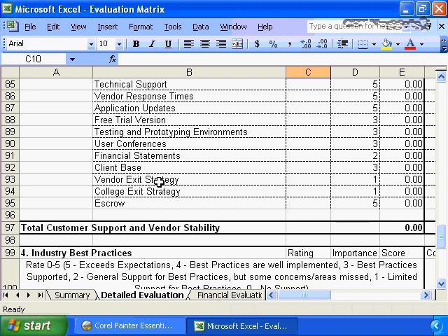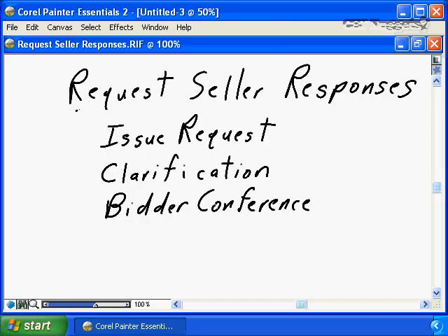It's very important that you develop an evaluation matrix such as this to ensure that your evaluation process is fair, that it truly selects the best response, as opposed to allowing intuition or gut feelings, or "I really think this is the best proposal" to be evaluated. It allows you to evaluate and select point by point which response is going to best satisfy your project requirements.